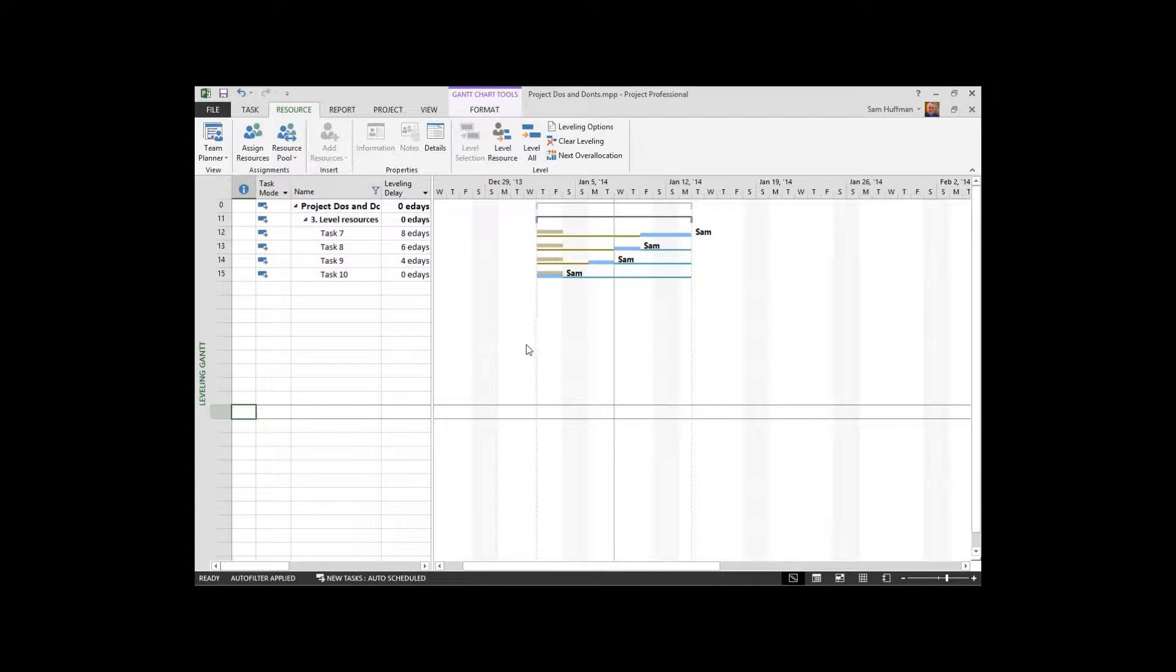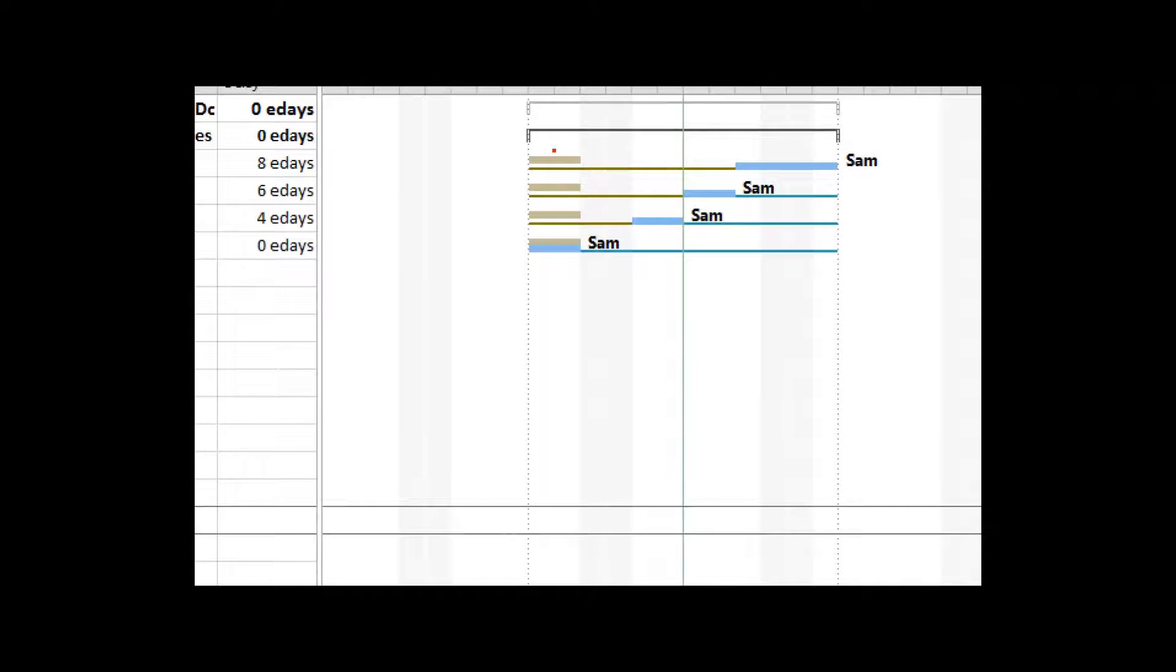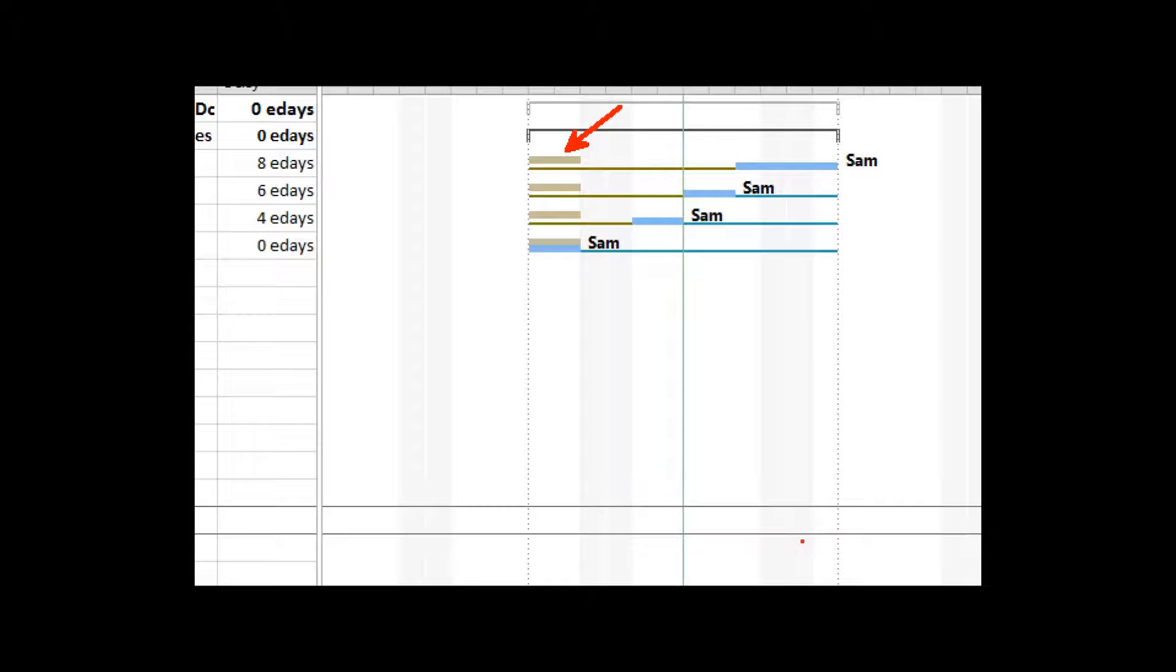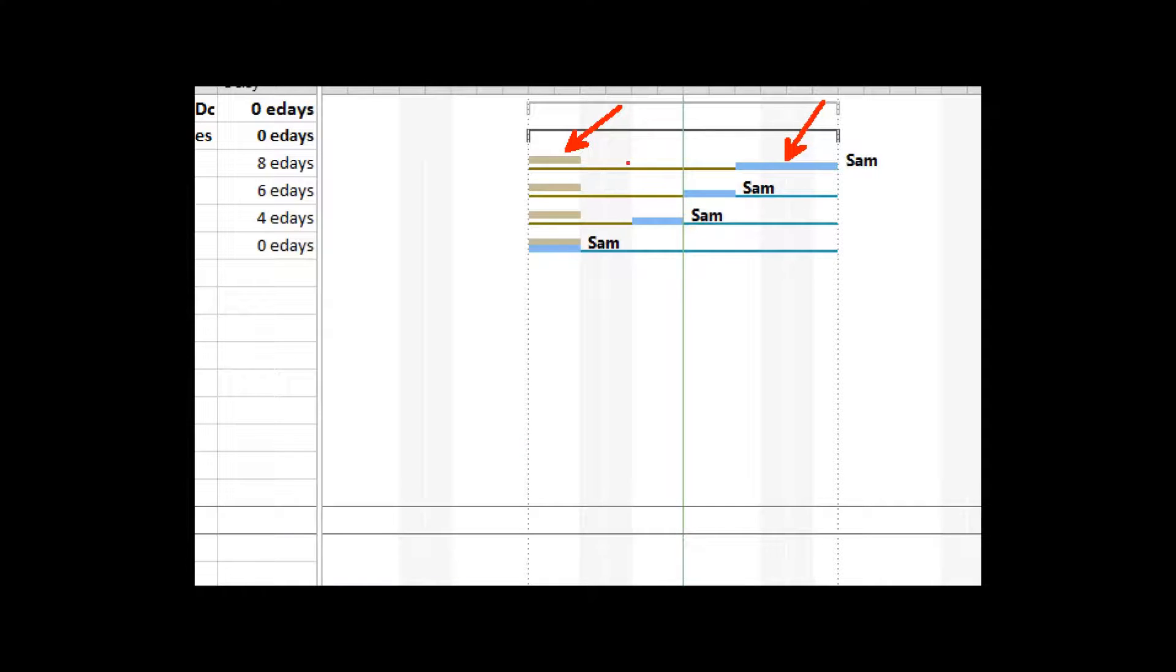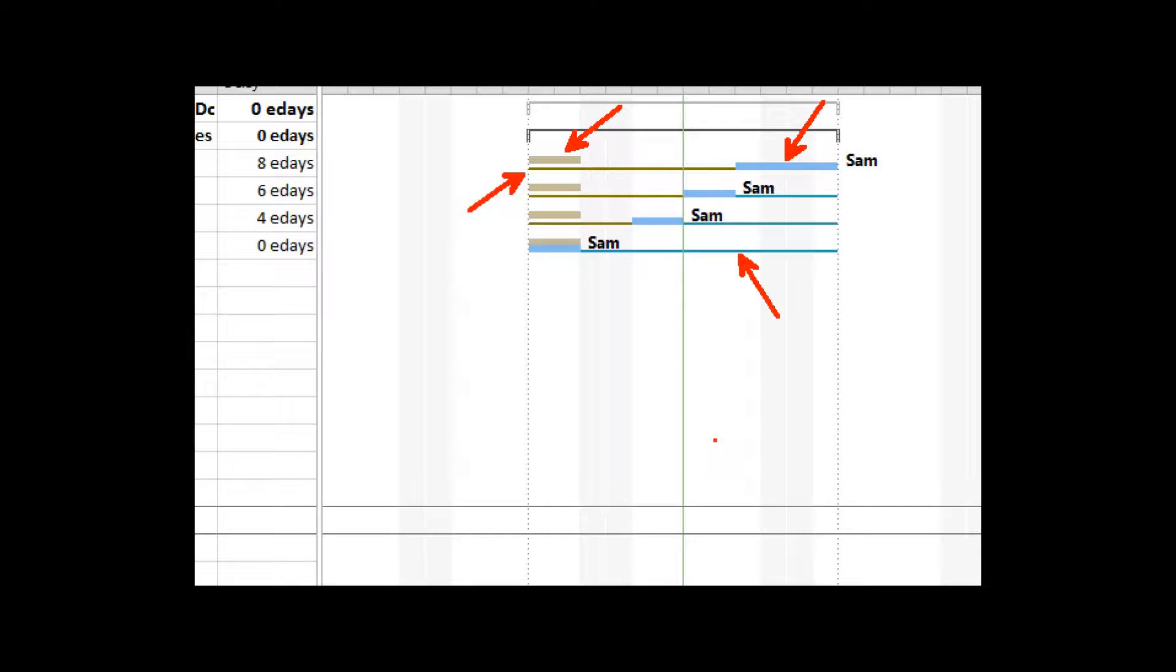So let me describe this. These kind of washed out gray bars, that is the pre-leveled position of the tasks in the timeline. The colored bars are representing the current schedule of the task in the timeline. The gold bar right here is representing the amount of leveling delay imposed in order to reduce the over-allocation or eliminate it.